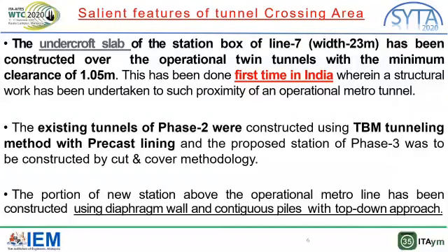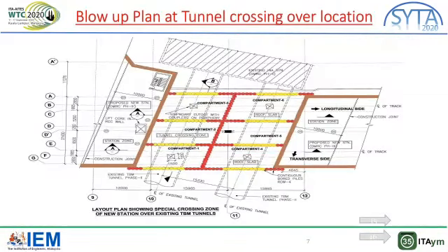an operational metro tunnel. The existing tunnels of phase 2 were constructed using TBM tunneling method with precast lining, and the proposed station of phase 3 was to be constructed by cut and cover methodology. The portion of new station above the operational metro line has been constructed using diaphragm wall and contiguous pile with top-down approach.